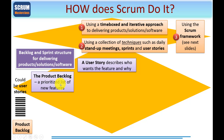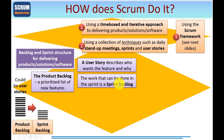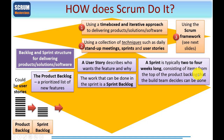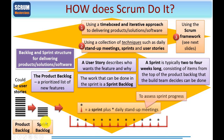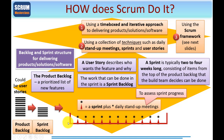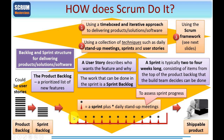The product backlog is a prioritized list of new features — almost certainly in the form of user stories — from which you extract what's known as the Sprint backlog, which is a subset of this. The Sprint backlog consists of those items that you can complete and release early to get early customer benefits. A Sprint is typically two to four weeks long, consisting of items from the top of the product backlog — top in terms of priority — that the team decides can be done from the Sprint backlog. The Sprint framework helps you to complete the products as efficiently and effectively as possible, so you end up with a shippable product.